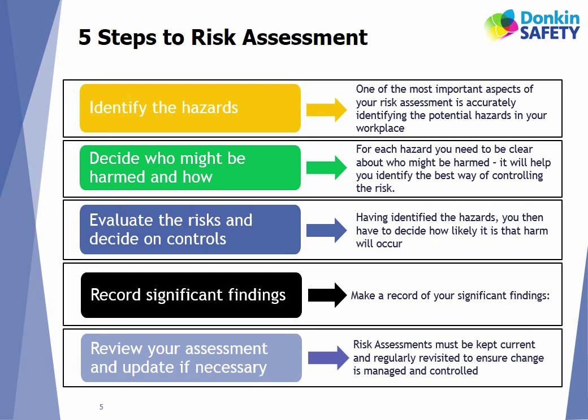Review the risk assessment with colleagues, other members of the work team. Risk assessments are a living document that need to be reviewed if there are any significant changes, but at least every 3 years.